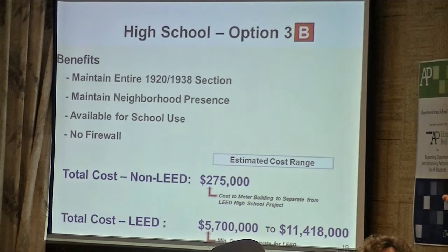Then we submit to the USGBC to get it LEED certified, which we're looking for gold now in order to achieve this grant. And at that point, we would have to show that we have separate utilities, unless we're tying the whole building back into it. Which would be when, that we need to know for her question. At the end of construction. Would you have to do some work before the end of construction if you're going to change the service and all? Yes.